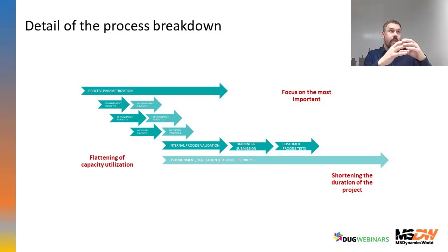Usually, the plan is much wider. It is much longer because there are buffers. I will speak about them later. There are times to plan another projects and so on, because usually every company could have more projects and some teams can be involved in more projects.